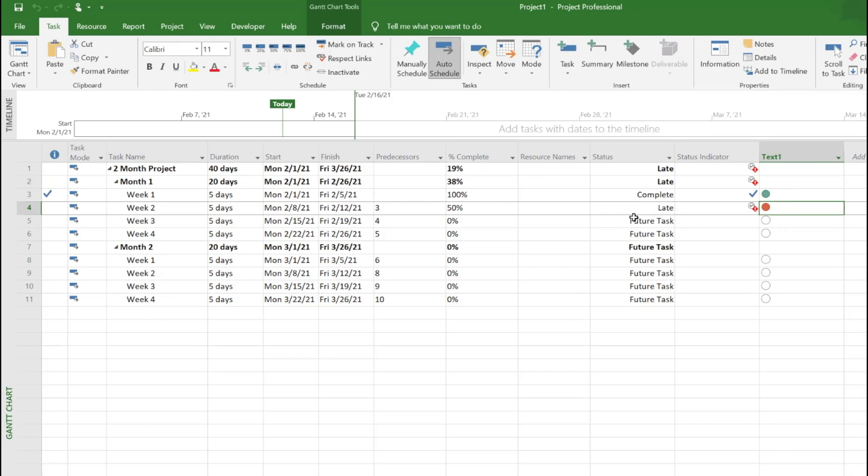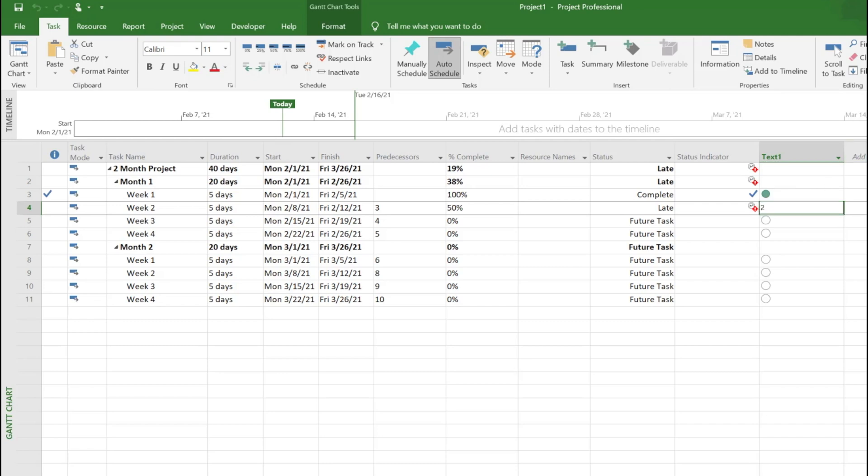Now when you look at it, you can see anything that's complete is green, late is red. In MS Project, the status is stored as zero, one, two, and three. Complete is translated as zero, that's why for zero tasks we marked it as green. For red, if you hover over, you can see number two because anything late is translated as text two or number two.